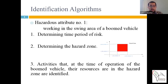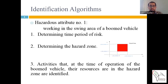At the first step, we consider the execution time of the activity to which the boomed vehicle has been assigned as a resource, and consider this time period as the period of risk. At the second step, the hazard zone is determined based on the coordinates of the boomed vehicle's location in the model and its maximum rotation radius. As you can see in the picture, the hazard zone is estimated as a cube. Finally, activities whose resources are located within the hazard zone during the boomed vehicle's operation are identified — these activities have hazardous attribute number one.